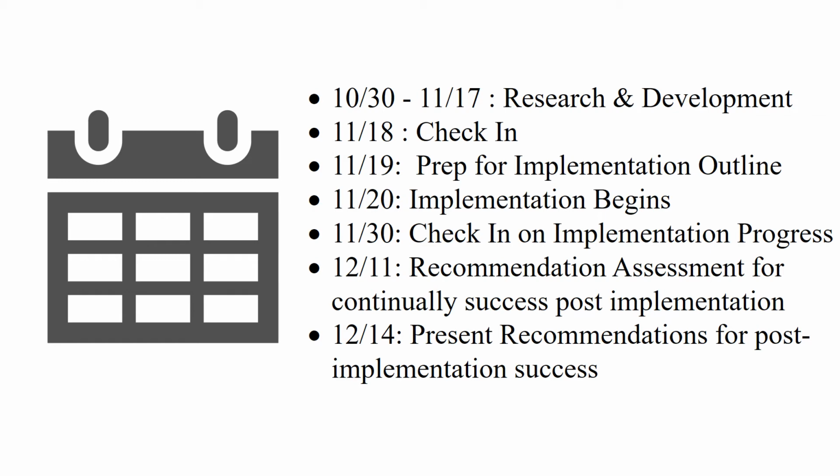From October 30th to the 17th of November, we had our R&D period, our research and development. We had a check-in on 11/18 scheduled. On 11/19, we began prep for the implementation outline. And on 11/20, implementation began. On 11/30, the check-in on the implementation progress was scheduled.